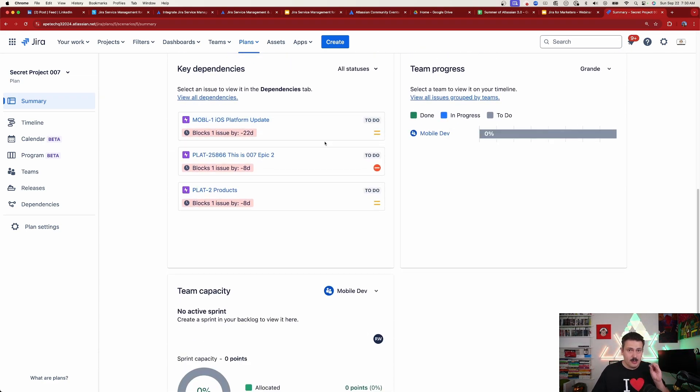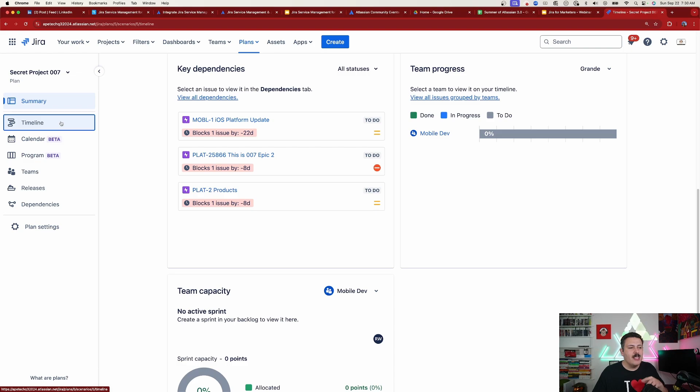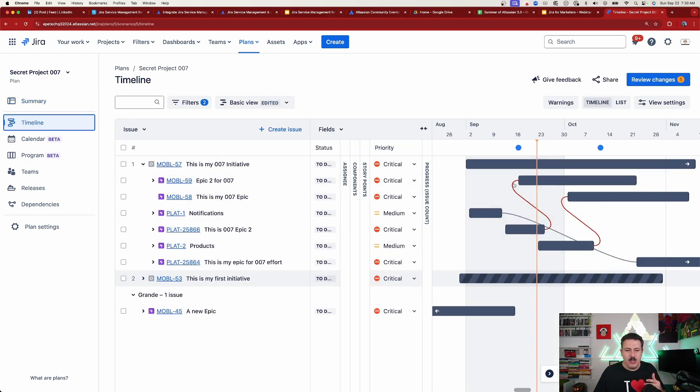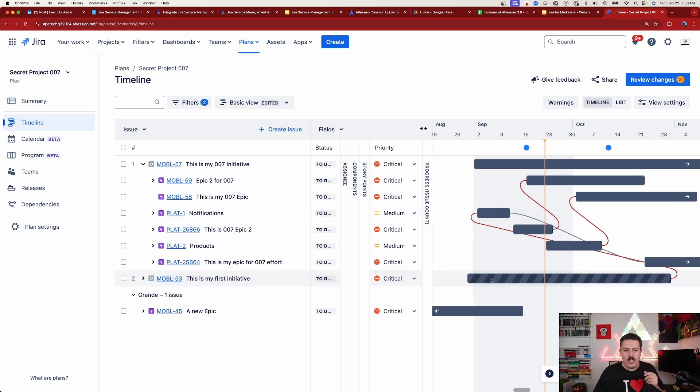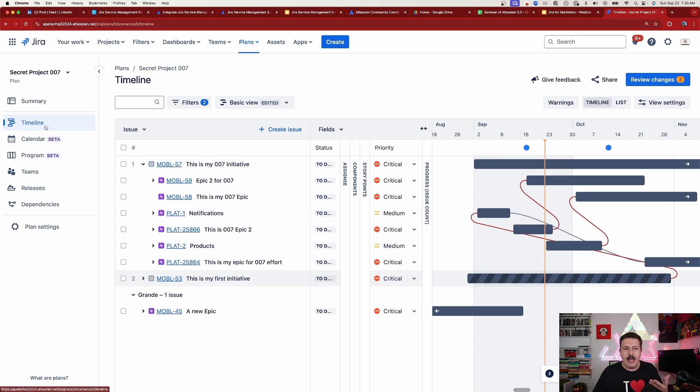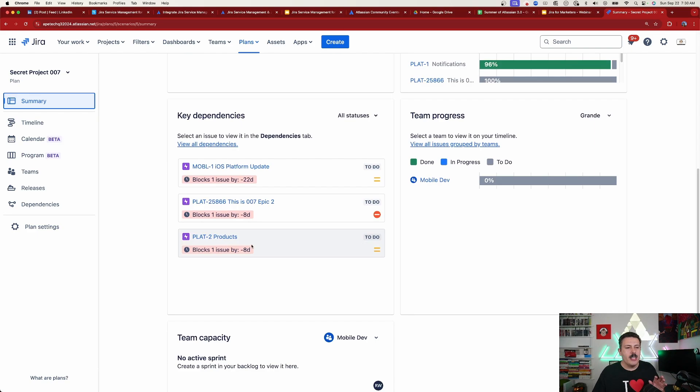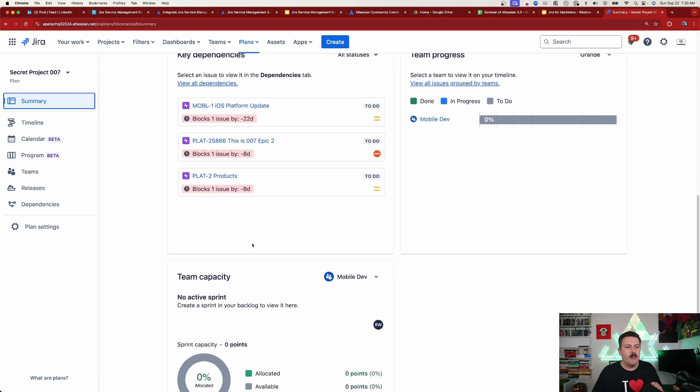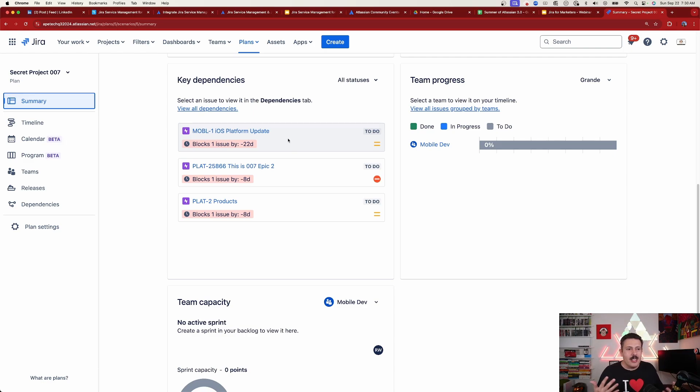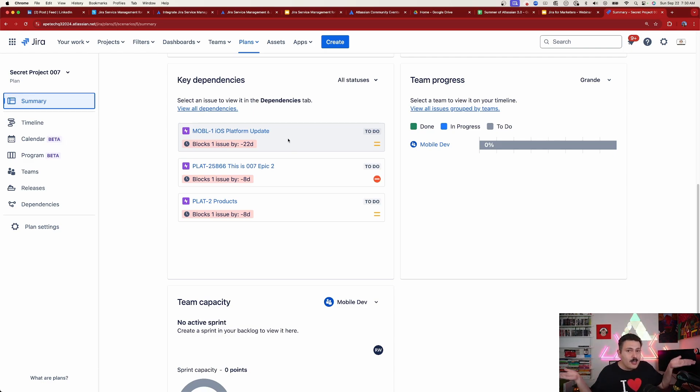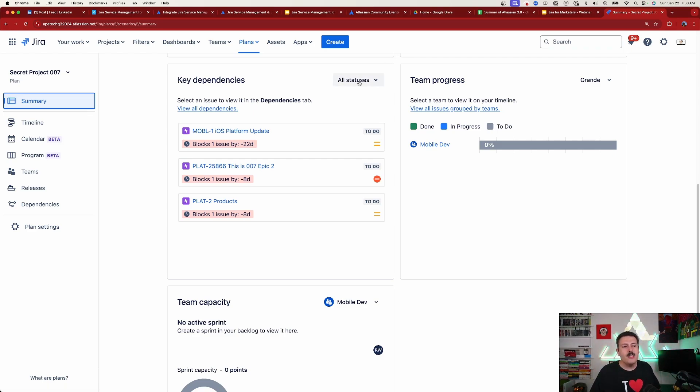We're going to see key dependencies. Now, this does depend, no pun intended, on you having that blocks and blocks by relationship, which is really easy to do because in the timeline view, all you got to do is link these issues together. You just grab the little plus sign, you drag it to another issue, and you've established that dependency. And now it's going to be visible over here on the keys dependencies. This is going to show you key dependencies. This is JIRA analyzing and looking at your data and going, these are the most critical things you've got to go take care of as a team. But you can click on this view all dependencies and see everything. Your dependencies, you're going to be able to see all statuses or pick from those categories.